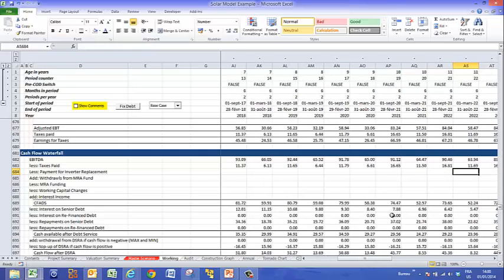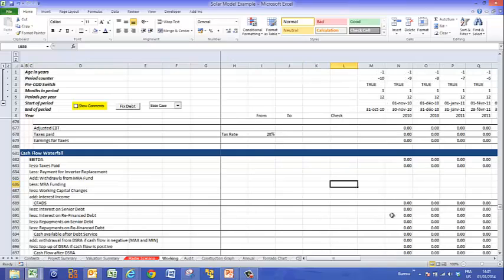When we actually pay for the inverter replacement, that's negative cash flow, but we offset that with the amount that's taken out of the fund, and then we want to subtract the amount we take out of our pocket and put into the MRA fund, and then we'll get an adjusted cash flow. So let's first go, I think we can get most of this.